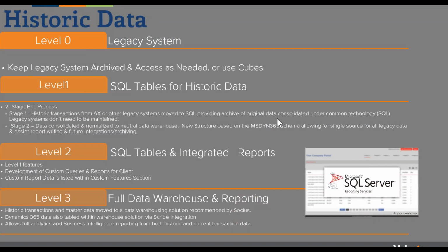All right, another important consideration when you're moving from Dynamics GP to Dynamics 365 is what to do with your historic data. And so typically we bring in GL summary balances back to the beginning of the fiscal year. So if Jen Johnson's company runs on a calendar fiscal year, I would only have a few months of GL data coming in, because here we are the end of February. I would only have a few months of summary balances coming in as a standard. If we were going live in August, I would have 8 months of my GL summary balances.